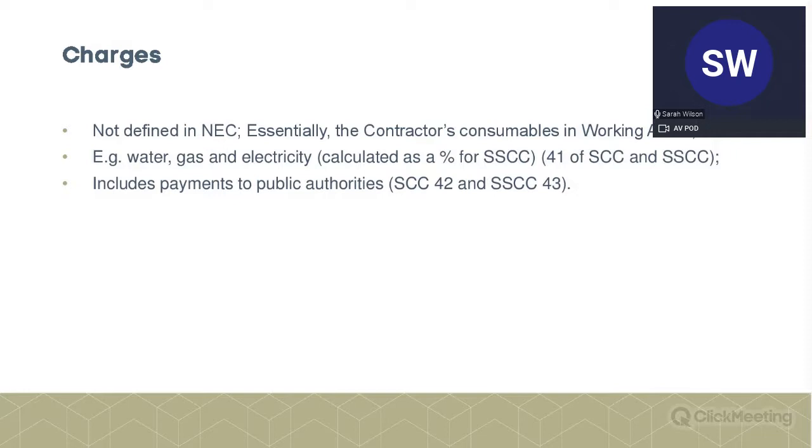And, I guess, if it's a really small compensation event, small value, it's probably minimal cost anyway, so it's probably insignificant. The difficulty comes when you have loads and loads of small value compensation events, which then start to dwarf your fixed price. And I have seen this. I've seen contracts where the compensation events end up being an extra 50% and more of the actual contract price.